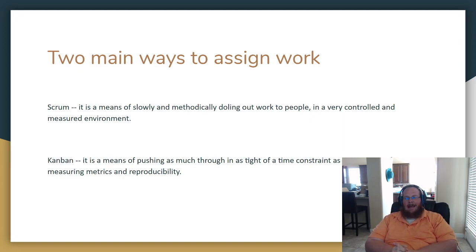So if it takes you an hour to put a door up on its hinges, you could almost say that pouring the foundation takes 8 hours. Not quite, but it's a good association to use for metrics.